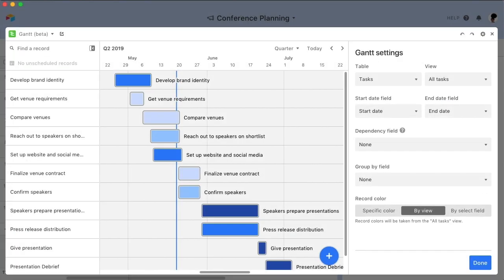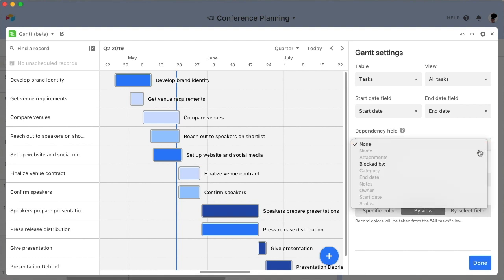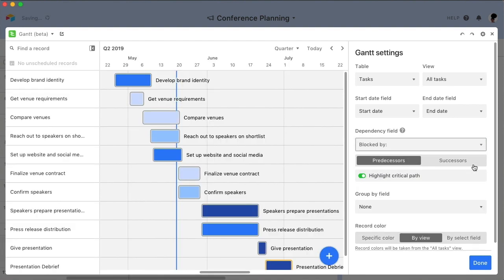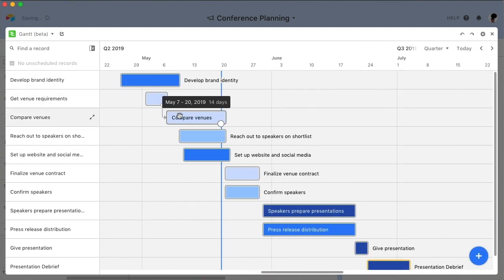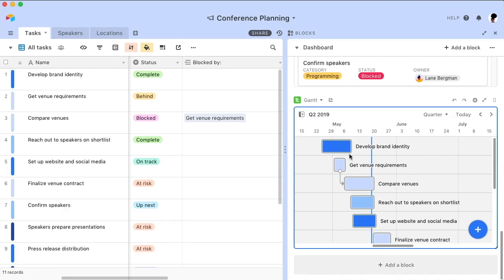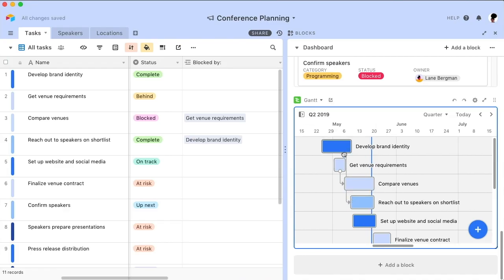Instead of immediately adding information to this field, I'll choose it as the basis for dependencies in the block's settings and specify that it's a predecessor field. Now I can manually draw dependencies on the chart itself, and this information will automatically be added to the linked record field on my grid.